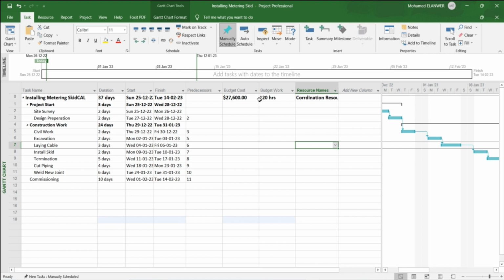We can ask ourselves what is the difference between normal cost and budget cost. Normal cost is the cost for the resources used while the project is running, while planned budget cost is the total cost for all planned resources, and it's mandatory to be calculated, as it's very important in a feasibility study, which will support shareholders, decision makers, and managers in the company in order to take a decision on proceeding with the project or not.